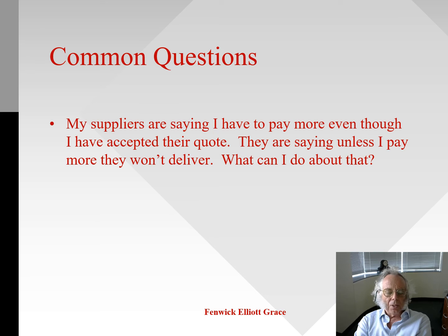But the problem is that, say for example, they've quoted you $25,000 for the timber, and they're now saying they're not going to deliver it unless you pay $30,000. It's going to cost you a lot of money to have that fight, and it's going to take a long time to have that fight. So maybe what you should do is get some legal advice about it, perhaps write them a letter and say, look, I'm going to go and buy the timber from somewhere else, and if it costs me more, then I'll be claiming the difference from you, similar to what the owner might do against you if you break your contract with the owner.